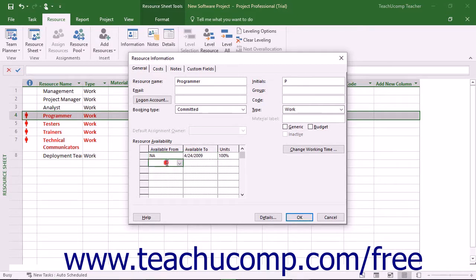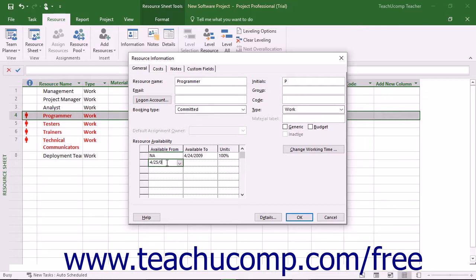Then select the start and end dates of the second week of the project from the Available From and Available To drop-downs, and set 200% for the units.